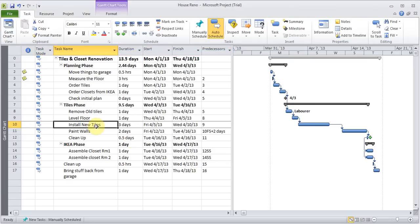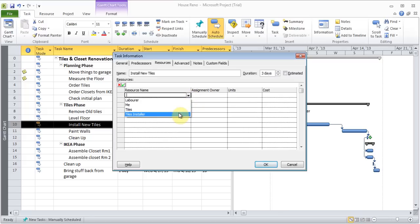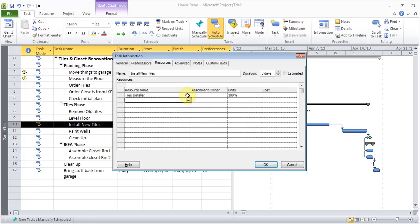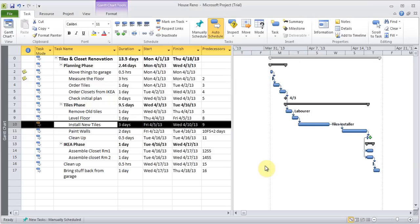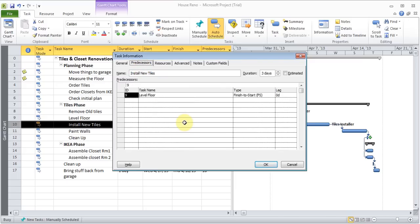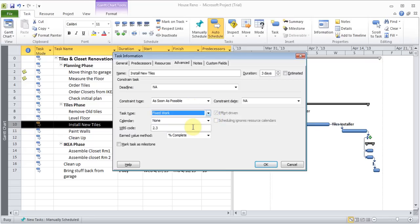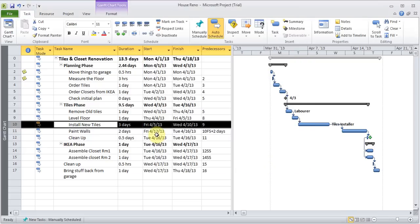I can go to the Install New Tiles. Three days. And I can say the main guy is this guy. And I'll just do that for now. I'll click OK. And that guy is added. I just wanted to bring another topic that I talked about earlier. About, double click on it. And I'm going to go to predecessors. So I wanted to bring that under advance. We had that task type. So I wanted to change this Install New Tiles to fixed work, which will be effort driven. And I click OK.